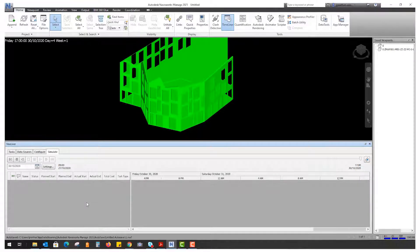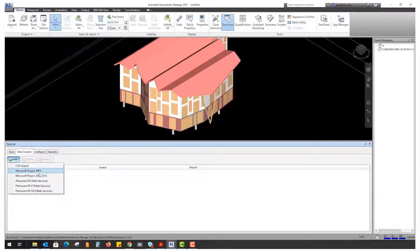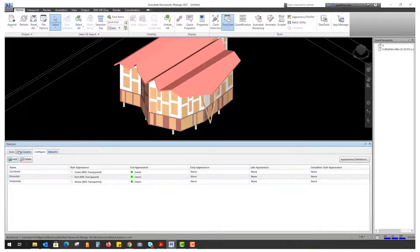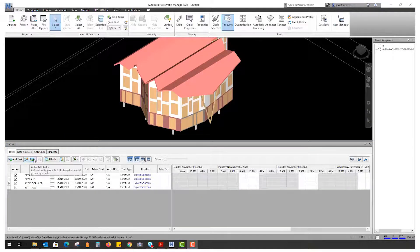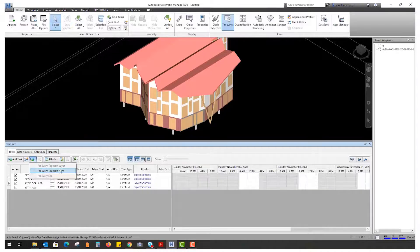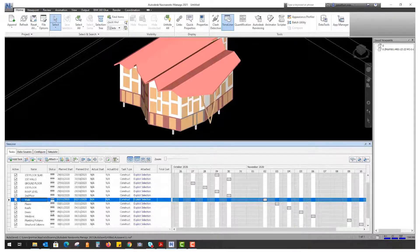That's a very simple model with four tasks. A real construction model will have hundreds or thousands of tasks depending on the construction stage. You can link in with different data sources including Microsoft Project or even Primavera, which are commonly used on construction projects, and link that information directly into your tasks. You can also automate the adding of tasks.